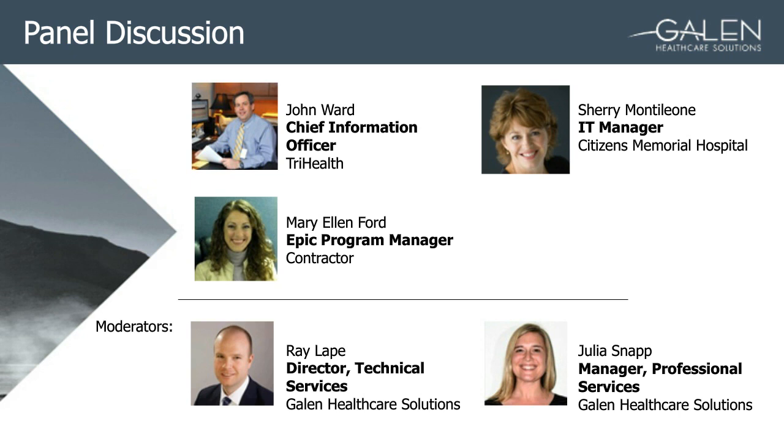Once you have worked through your governance structure and those providers have identified the data that they want to see at go live, that's when the hard work starts of trying to make sure you understand the technical feasibility. So one of the best things that we did was we came up with guiding principles for conversions, so we could remind the providers of these key things. Like Julia said early on in this presentation, conversion isn't about recreating your legacy EMR in your destination system. It's about continuity of patient care. So those providers have what they need at the time that they're going live with this new system.